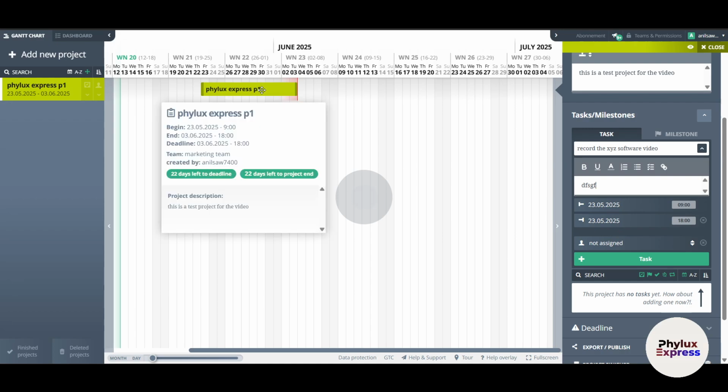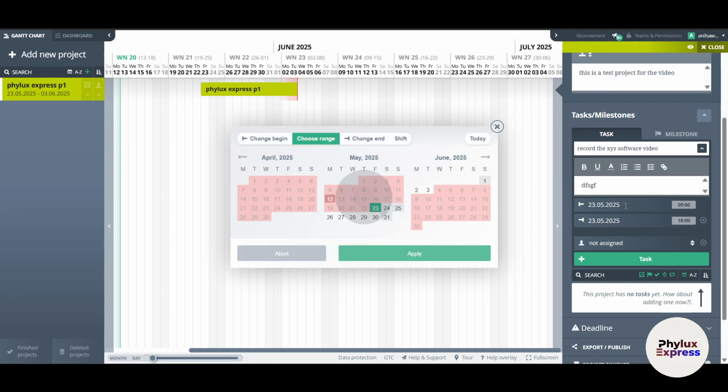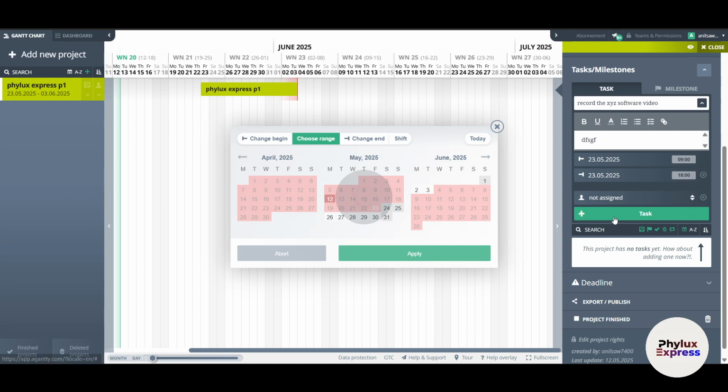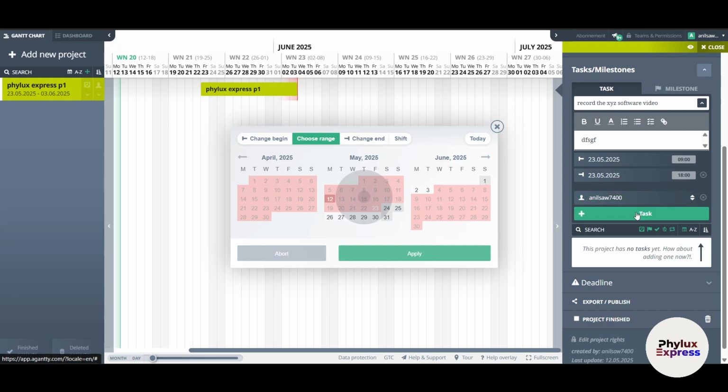Let's say the project goal is to reach 100K views in 6 months. I can put a deadline on this project, but I can also put a deadline on a specific task. Let's say to record a video, it should start on the 12th and end at, let's say, choose a begin date here. Okay, and it's already set, I think, because of the project. And now here I can assign it to a specific person. I will assign it to myself because I'm the only one available, and click on task.